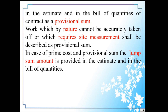In the case of prime cost and provisional sum, a lump sum amount is provided in the estimate and in the bill of quantities. So this is about prime cost and provisional sum.